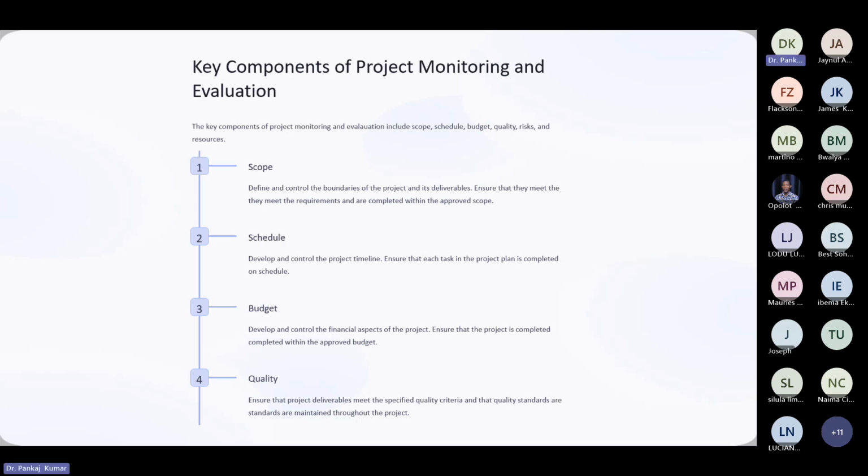We can estimate the cost associated with each project task and activity. This can be done by using historical data, expert judgment, vendor quotes, and other estimation techniques. We can consider potential cost risks and uncertainties, and include contingency reserves in the budget to address unforeseen expenses.